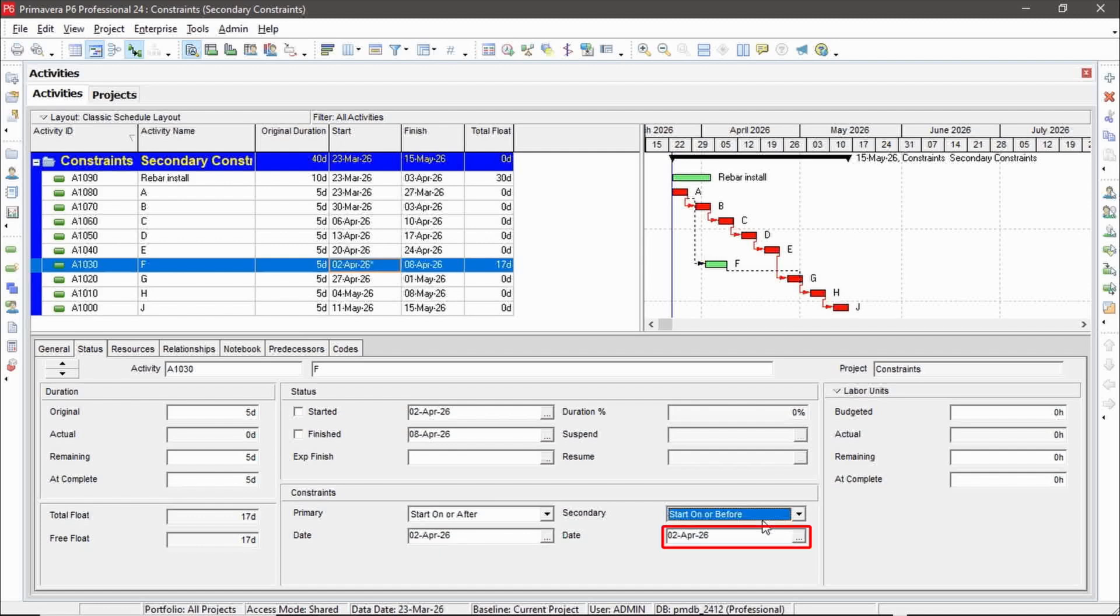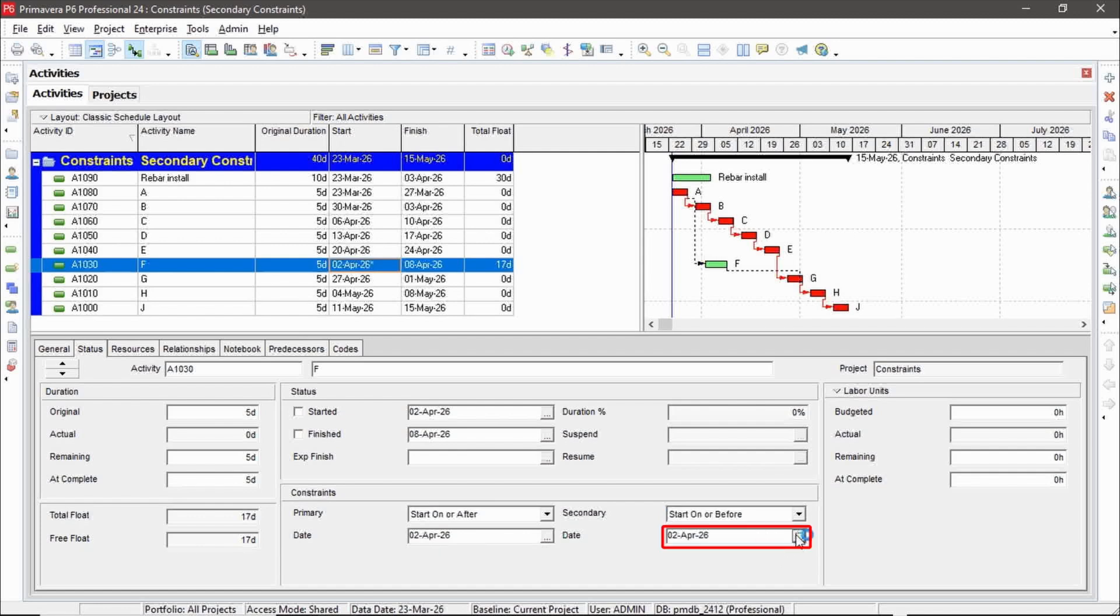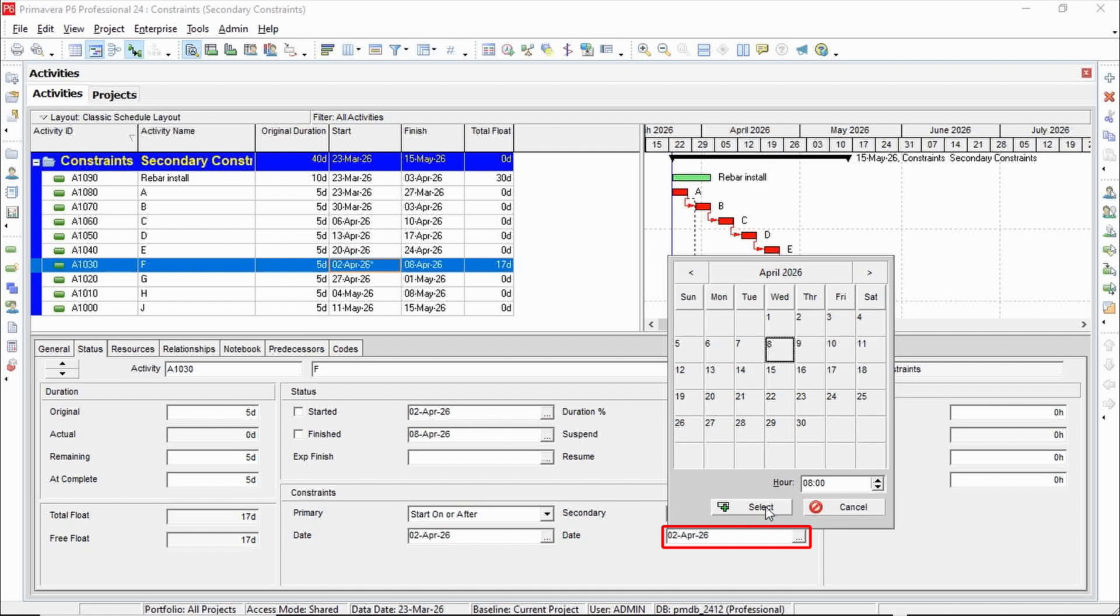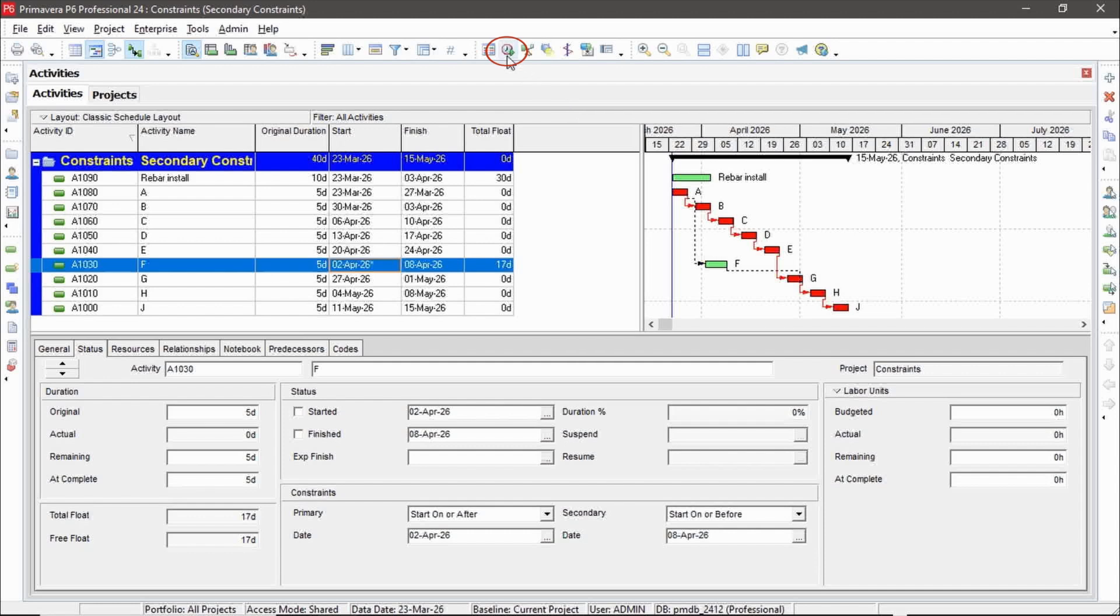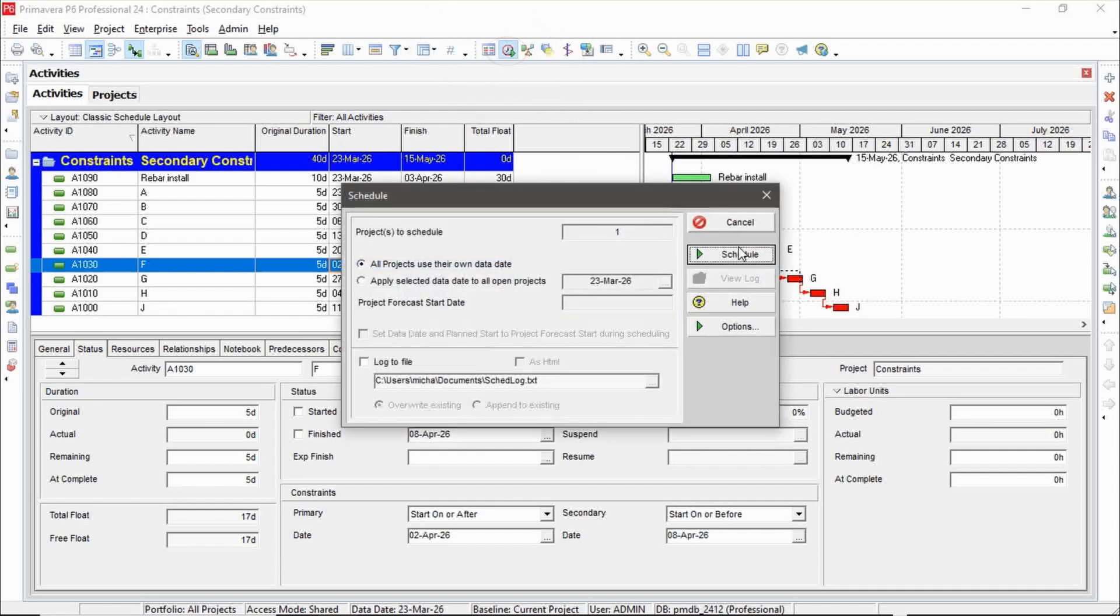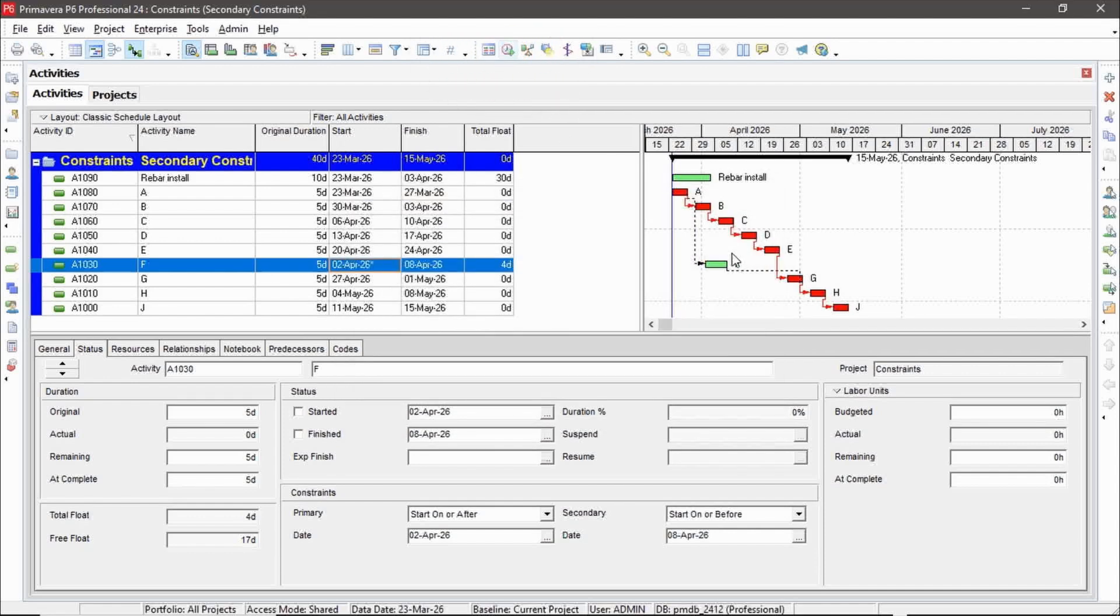I can be between these two dates that I specify: start on or after April 2nd or start on or before, and let's pick a date there. Let's say April 8th. Here is my total float, 17 days. Watch what happens when I reschedule. My total float goes down to four days.